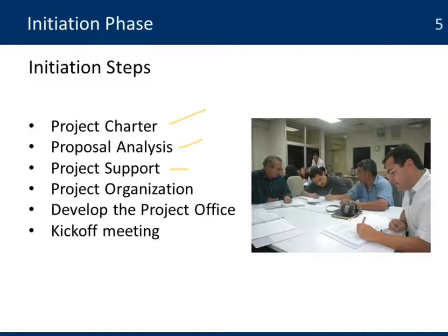The other element is your project organization, organizing your team, organizing your structure in your project, and the reporting levels that you'll have in your project. Then you develop the project office. That is, you set up the office environment where your team is going to be working. And then you can have the kickoff meeting where you can invite some key stakeholders, and that begins the official start of the project.